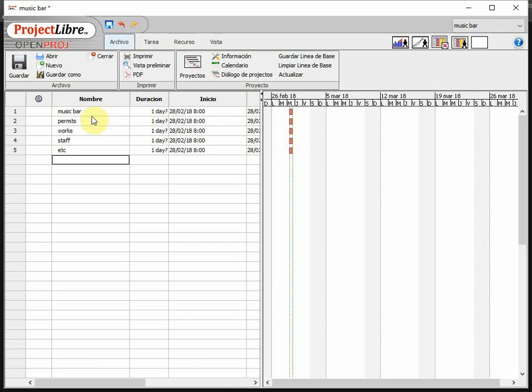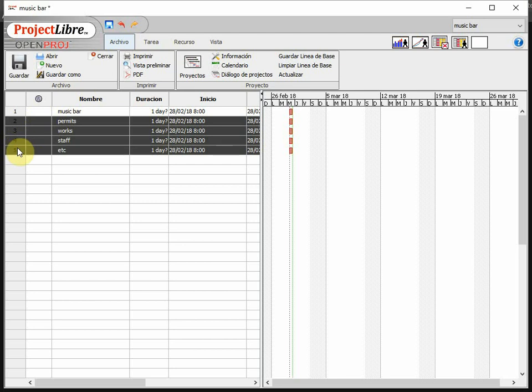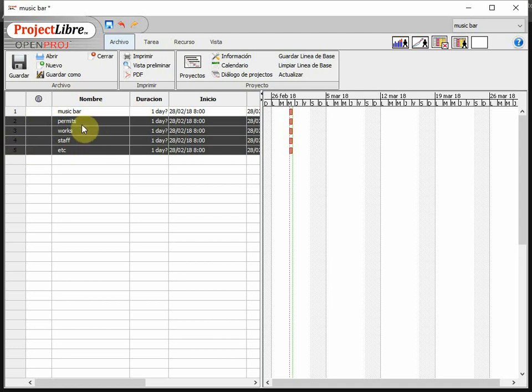Now the thing is that I introduced these five tasks just at the same level, just like if all of them were tasks. But actually, not all of them are on the same level. Actually, these four in here have to be inside of music bar. These are the four boxes or smaller boxes inside music bar. So the only thing I got to do is select them, the four of them.